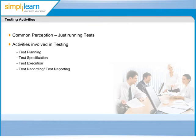In the test specification stage, we derive our test scenarios, test conditions, and test cases from business requirements documents. We also need to combine all these artifacts using traceability, which helps us in determining requirements coverage achieved during the testing effort. It also helps us in maintainability of test deliverables in case of any changes to a particular requirement. Prioritization of test case execution will also be done at this stage, considering business risk associated with each requirement as the main factor.